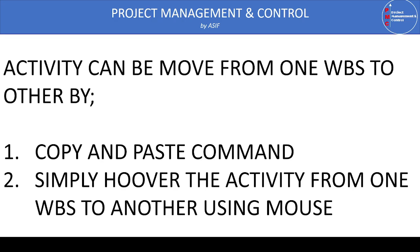The most common technique planning leaders use is the copy and paste command. Just go to an activity, right-click, select copy, then move to another location and paste it there. This will place the activity in two locations. If you want to move an activity completely from one location to another, use cut and paste — the activity will be deleted from the original WBS and placed in the new WBS.